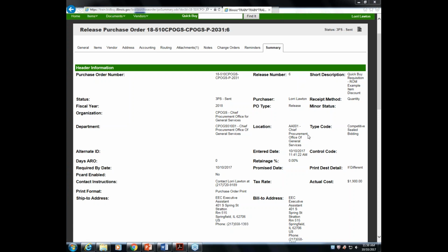And then we have a question. Once the vendor signs, who does the document come back to? So for release off masters, once the vendor signs, the signed purchase order and supporting documents would come back to the buyer, or whoever in your agency based on your agency process. So it would not go back to the CMS buyer, for instance, for a release off master. It would go back to whoever in your agency has the authority to receive that and get those signatures.